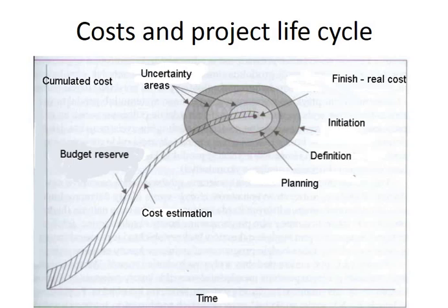As you can see, after each phase of the product cycle, like initiation, definition, planning, this area is smaller. So if you move on from the very beginning of planning to the execution of your project, also you can decrease your budget reserve, and this is important, as from the point of view of the whole organization, you don't need to keep this money somewhere.